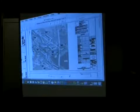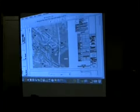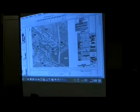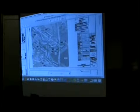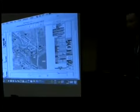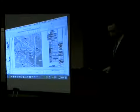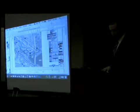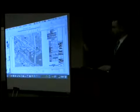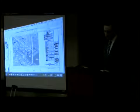Again, Andy Street with Civil Design Consultants. As was just mentioned, the changes that I took away from last meeting was the change from the silt fence and silt sock detail to hay bale and silt fence line. That's been done and is on the plans, and the notes have been updated. There's a wetland located on driveway 5, which is in the top left corner of this plan, that was not previously shown, that is shown now.